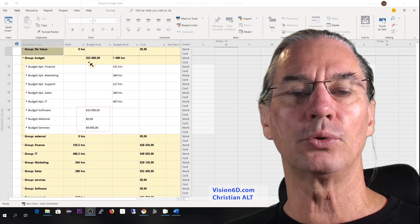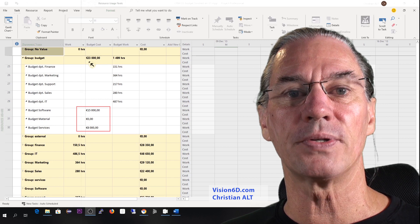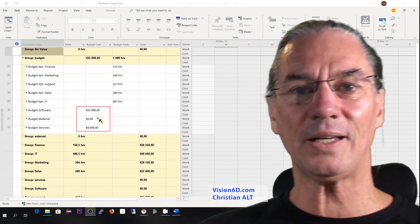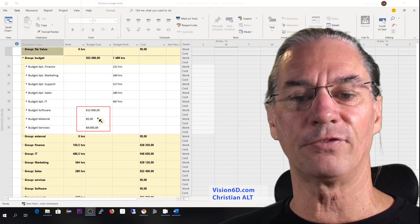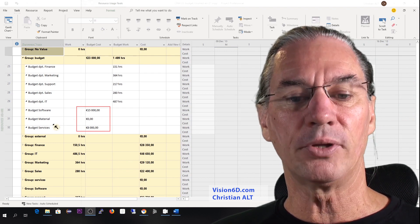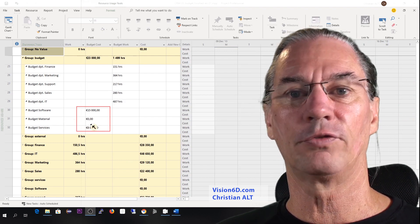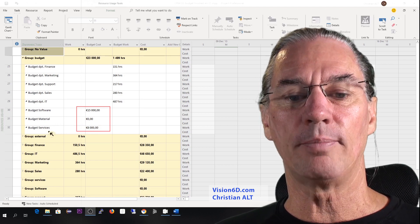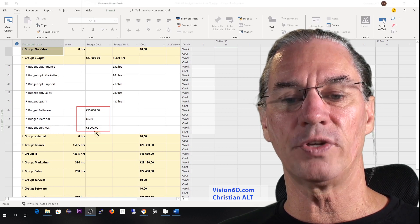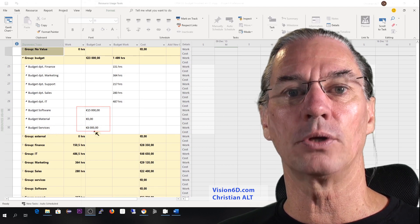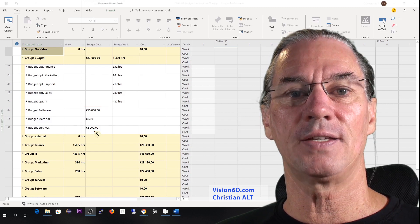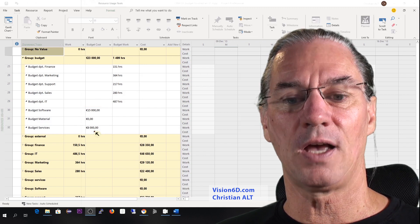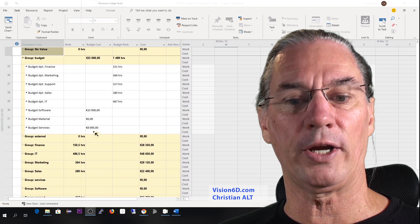If we go back to the 23,000 euros invested in the project, they are composed of a software budget. For material, nothing is involved at the moment, and we have a budget for services of 8,000 euros. This is an external company which sends us a consultant for training.